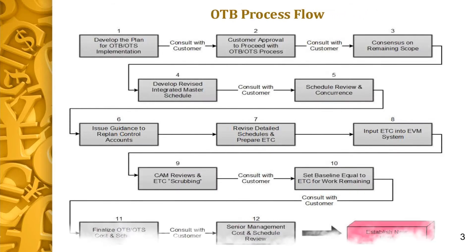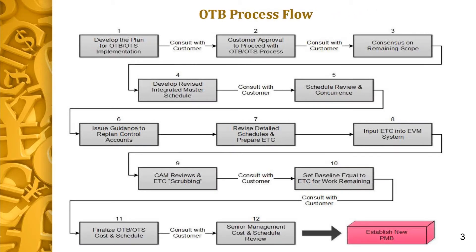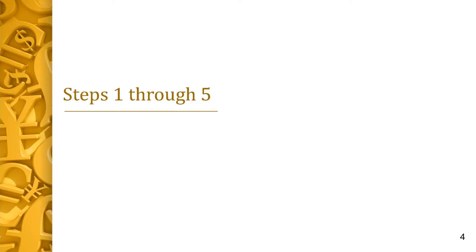This process flow is from the OTB and OTS Guide. We will follow this flow as we examine the guide's recommended 12 steps to execution of the new PMB. The flowchart steps refer to contractor actions and identify when customer interaction is essential. Note that early involvement and frequent interaction with DOE is critical. Implementing an over-target baseline is as involved as the project's initial baselining process, if not more so.